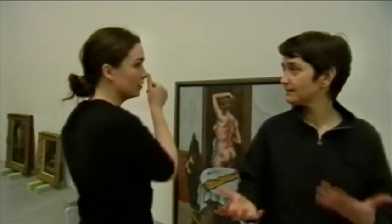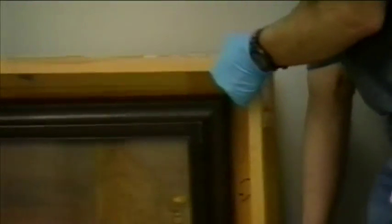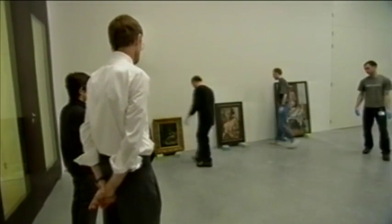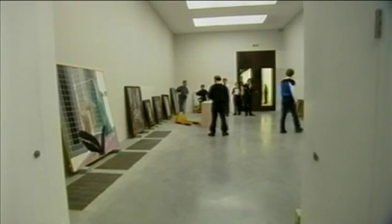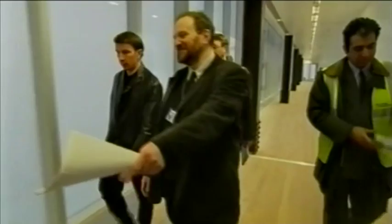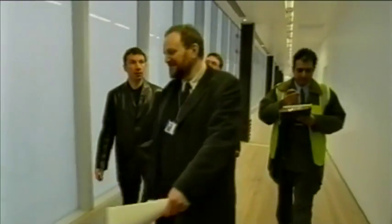By the way the pictures are juxtaposed, often painted by artists 50 or more years apart, the new arrangement should give insights that aren't possible with the traditional, strictly chronological layout. The Tate is almost ready to open on the day they said they would 5 years ago, May the 12th, and they've come in on budget too.